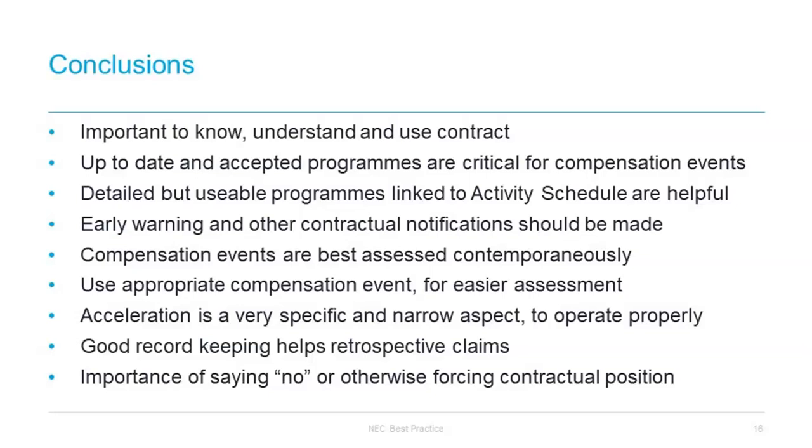Finally, please remember the importance of saying no or otherwise forcing the contractual position. Do not be afraid of notifying the employer that they've rejected your programme for an invalid reason, or tell the other side when they are doing something wrong. Say no if you're being asked to accelerate and you've been given a quotation, or if it's not been agreed yet. And do not put yourself in a position where you cannot adhere to the obligations which you did not need to agree to.